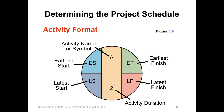Each activity will be presented by a circle or a rectangle — the shape doesn't matter. But it needs to include the name of the activity, the duration, the start, and the finish: earliest start, earliest finish, latest start, and latest finish. All this information has to be included within the network diagram activities.